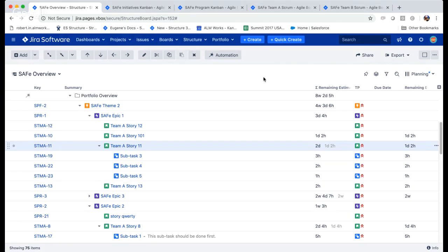Whenever you need to work with thousands of issues, Jira has some limitations. It's great for individual teams. You can use Agile boards for managing your Agile teams, and it works great. You get all the reporting, you can see what's going on, you can plan your sprints, things like that. But imagine you have 10 teams. It's becoming really hard. You can, of course, build a really large Agile board and try to create a number of filters there and look at it from different angles. But once your number of simultaneously worked on issues grows over 1,000, it's not really a very convenient solution.